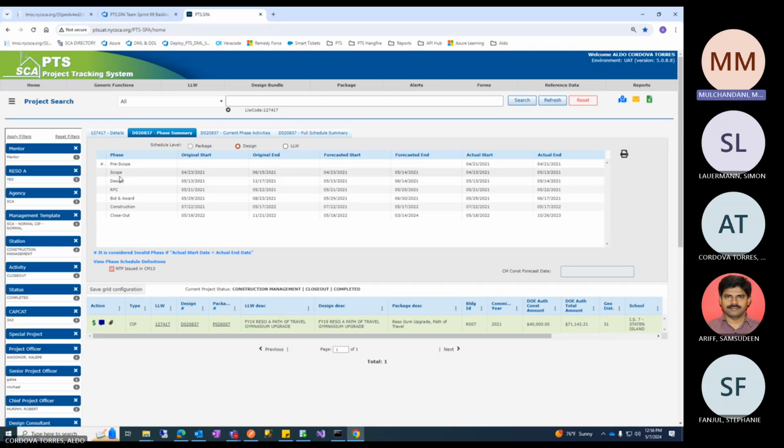So what happens is, scope and design are two activities done by ANE. So ANE is done with its work. Now next I'm going to hand it over to another department. So what would be the status? It would be AE, DE, ready to forward. When it's handed over to another department, it will be ready to forward.